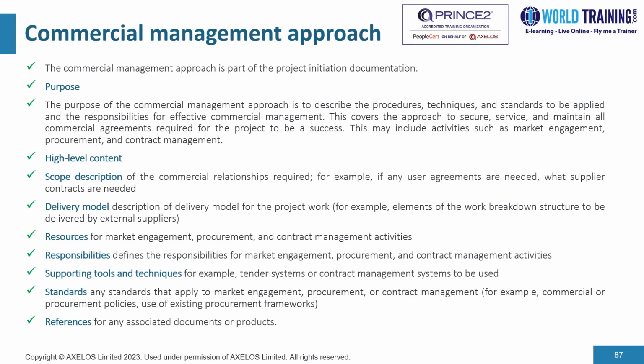It has a section on delivery model, describing the delivery model for the project work. For example, elements of the work breakdown structure to be delivered by external suppliers. It has a section on resources for market engagement, procurement, and contract management activities. A section on responsibilities, defining the responsibilities for market engagement, procurement, and contract management activities. There would also be a section on supporting tools and techniques, for example, tender systems, contract management systems to be